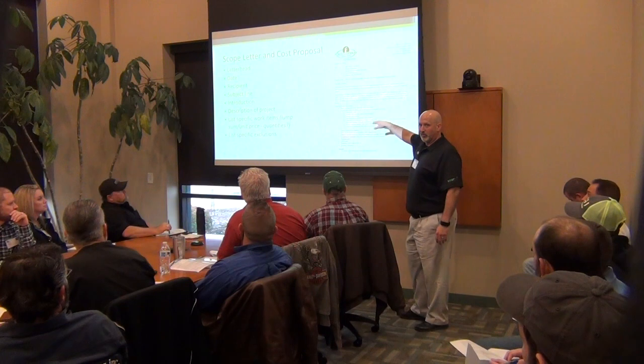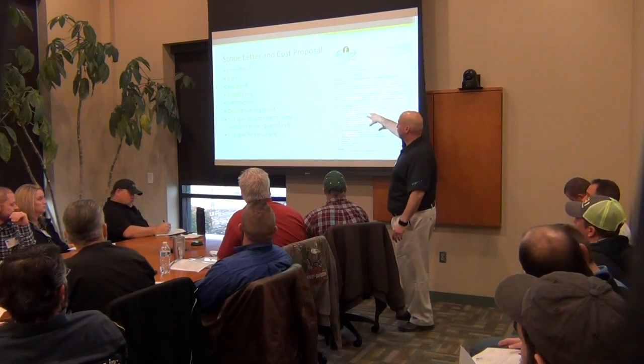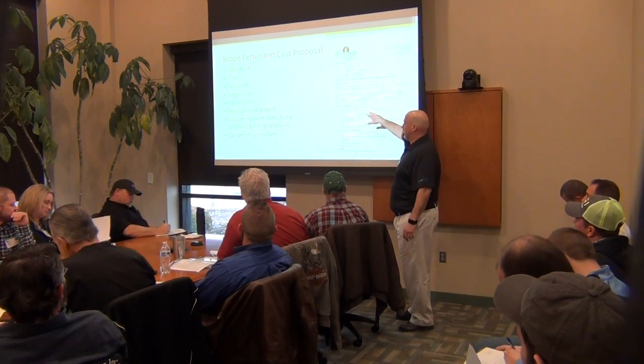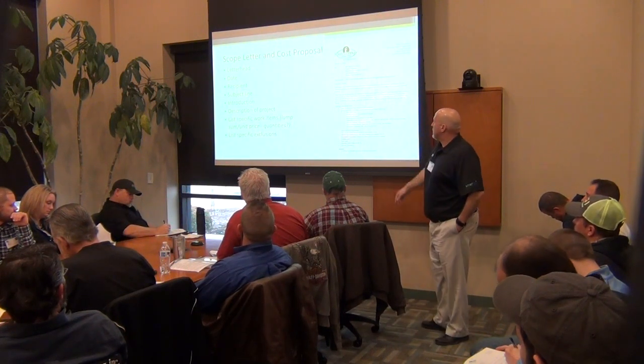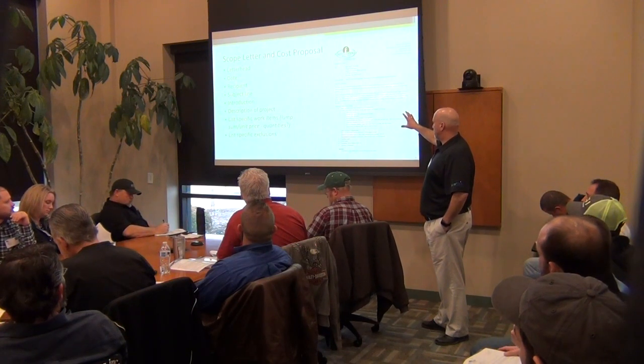You might say, hey, I've got a unit price for putting up so many feet of a metal stud wall, square feet, or I've got a unit price for cubic yard for earthwork. So, okay, this would be the area you probably want to put that in your scope letter.